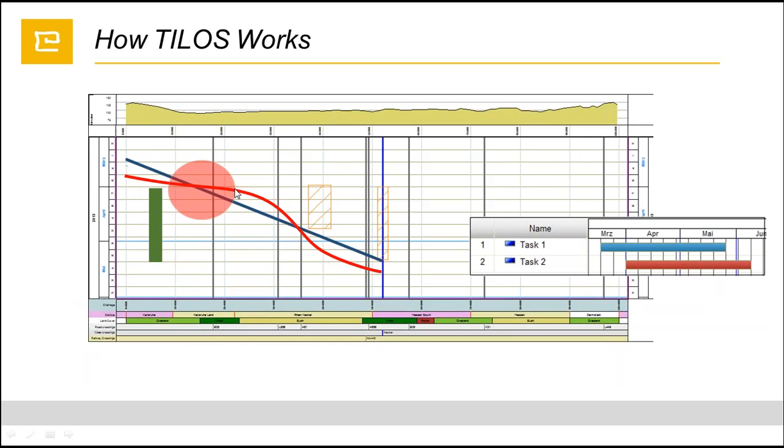Besides that, we are able to put in a distance lag. So in this case, we have put a distance lag between the two activities. For instance, the minimum distance, like we put here 2 kilometers, so they cannot perform any work closer than 2 kilometers.